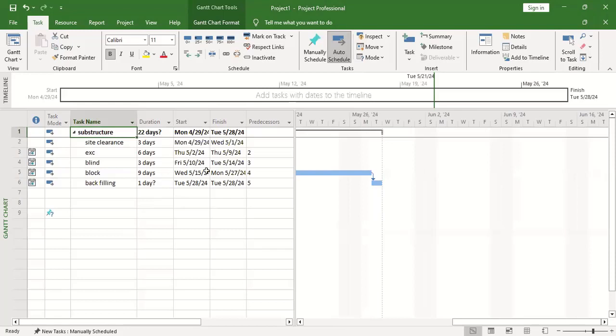Maybe your level, let's assume you are the CEO or the general manager of the organization. Your level of schedule will be that other project managers are doing their schedules and sending them to you, but your own schedule is based on the fact that, okay, we have a construction of so many classrooms in Kaduna, and this is how many days it will take to finish. You are not concerned about the substructure, superstructure, and whatsoever sequence of construction, right?